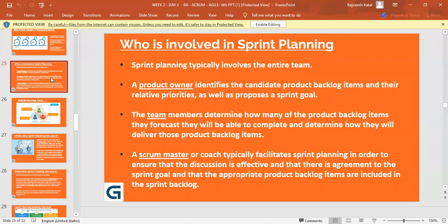So he is in jeopardy, like what to do, what has to be determined as the goal. But then again, as a team, they all take the decision. The development team is saying that they will not be able to complete the video chat part, so let us go ahead without it because it's not technically feasible for them. Then let's not push that. And then they all agree on a sprint goal. So this is how, with everybody's input and involvement, a sprint planning meeting takes place.